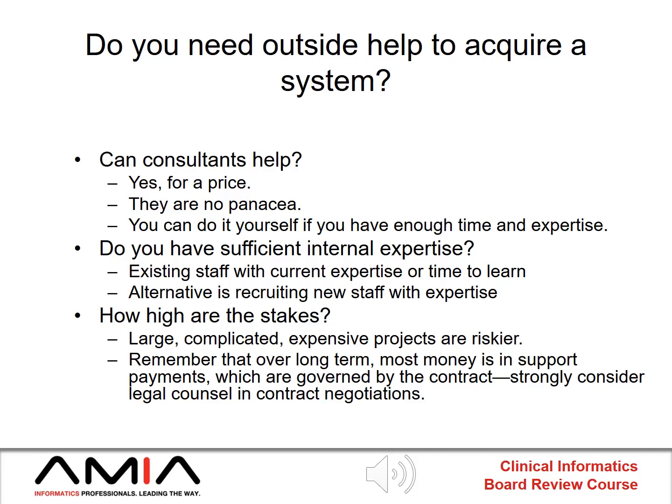You may have it currently, or you may want to recruit people who have the expertise that your organization currently lacks. The stakes in this process are high. Large, complicated projects with a lot of money involved are riskier historically. And remember when you're doing this that most of the money is not in the initial licensing, it's in the ongoing maintenance. So make sure you pay careful attention to the maintenance portion of the contract. And as I mentioned, legal counsel can be very helpful if you're not experienced and don't have the legal expertise necessary to carry out these negotiations and develop and sign a contract.